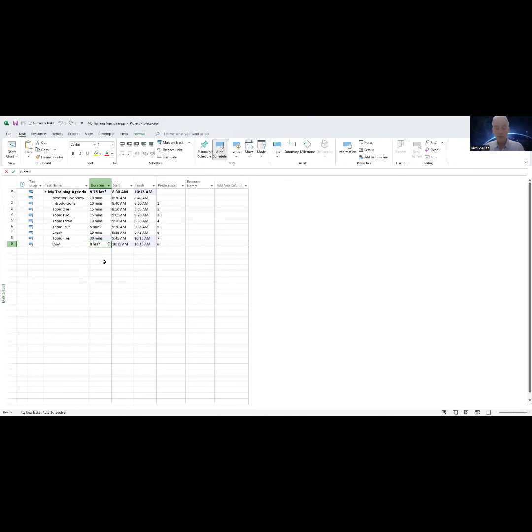Okay, I've entered all my durations except for the very last one here because I wanted to demonstrate one other feature. You'll notice that there's a question mark still up here at the top on the summary task. And that question mark is rolling up from down below any of the tasks or activities, basically saying, hey, this duration has been estimated by Microsoft Project and not planned by you.